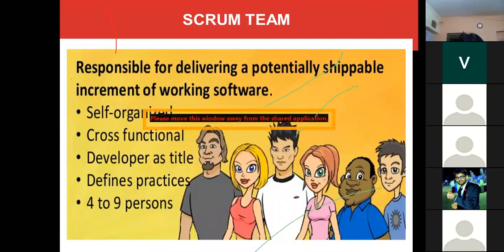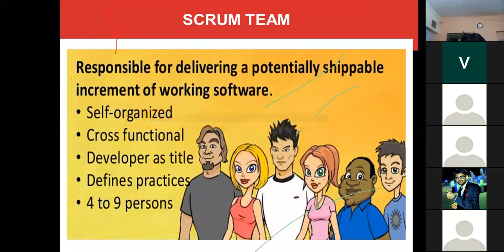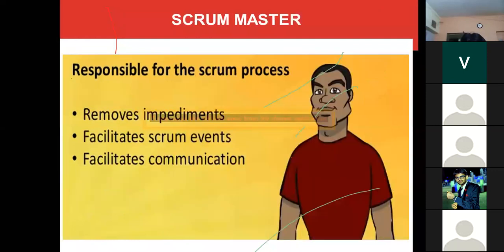Also, the Scrum team can write user stories on their own behalf as well, and the estimate should be provided by the Scrum team only. Estimates can be in the form of hours or story points, and either can be followed in the entire Scrum methodology. So this is what the Scrum team does, and next, the role of the Scrum Master.